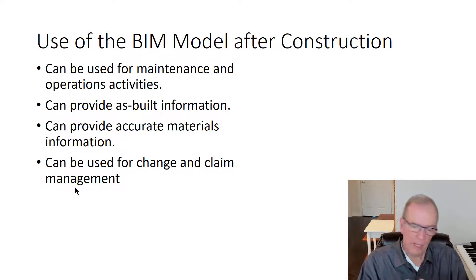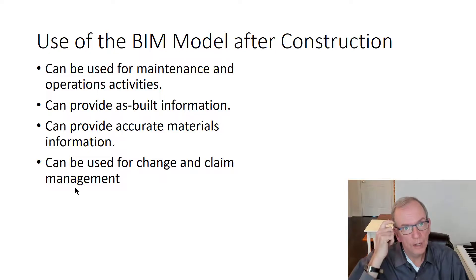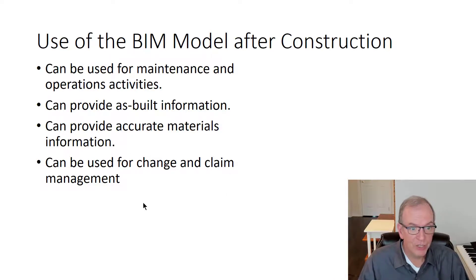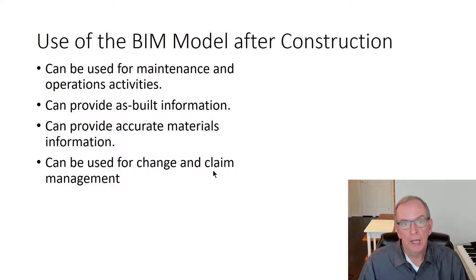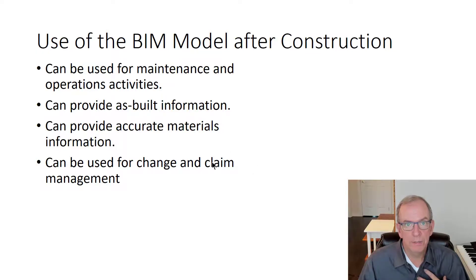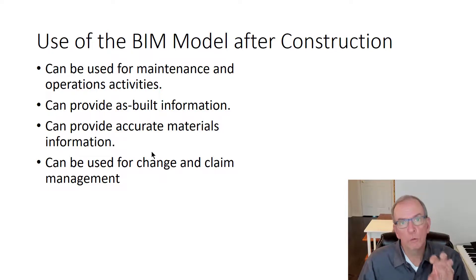It can be used by clients and it can be used by contractors — it depends on the situation, including liquidated damages. A claim is just a change that has not been accepted — it's in that limbo process, maybe accepted with a change order written, or maybe going to litigation. The idea is to not have anything go to litigation. The best way is to be very professional and be able to demonstrate the impact of a change that is costing you money. That's a really good tool, and BIM is good for that.